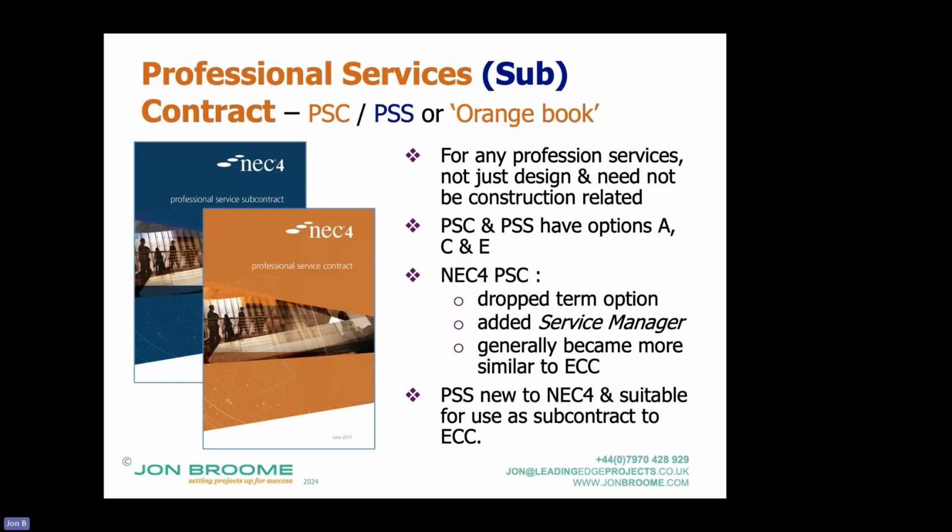What it also means, though, is that let's say someone wanted to employ me under that, or let's say a partner in a consultancy who might be paid a low salary but a high dividend or whatever. Well, if their cost of employing that person is worked out using a schedule of cost components, you're going to end up with a very low rate. So you wouldn't get the more senior people working on the contract if that was the case.